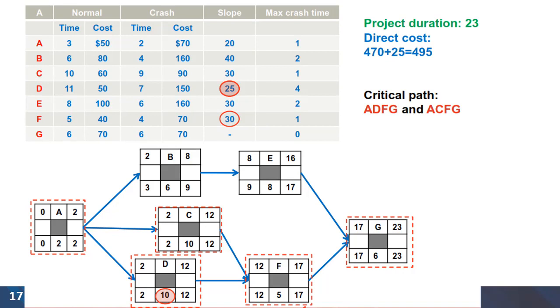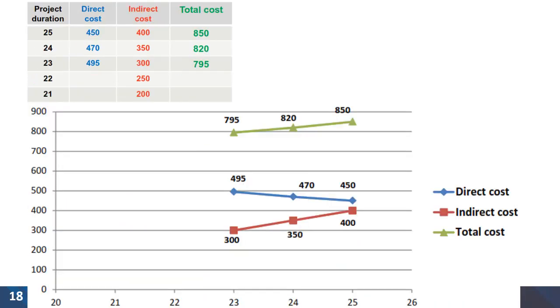So that cost is added to the previous cost of 470 and the duration is reduced to 23 days. We need to redraw the project network to find a critical path. In this case we have two of them. The situation for the project can be plotted. Now the total cost is decreased to 795. We are on a downward trend. So it's making good sense to continue crashing.